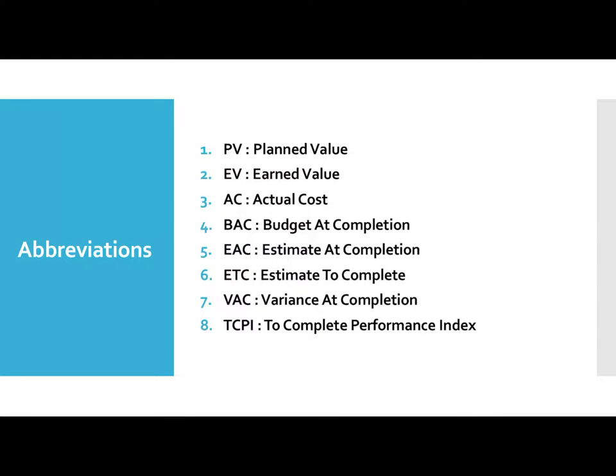So you've got planned value. Planned value is what you had planned to complete in X number of days, and if you have completed that, you'll actually earn that value. If you're falling short, then you're behind the planned value. If you're faster, you're ahead of the planned value. Earned value is like you plan to do work of say 10 days and earn a value of those 10 days of work. Now in that 10 days, if you just completed say 8 days of work, your earned value is just 80%. Okay, so the client is going to just pay you for the 80%.